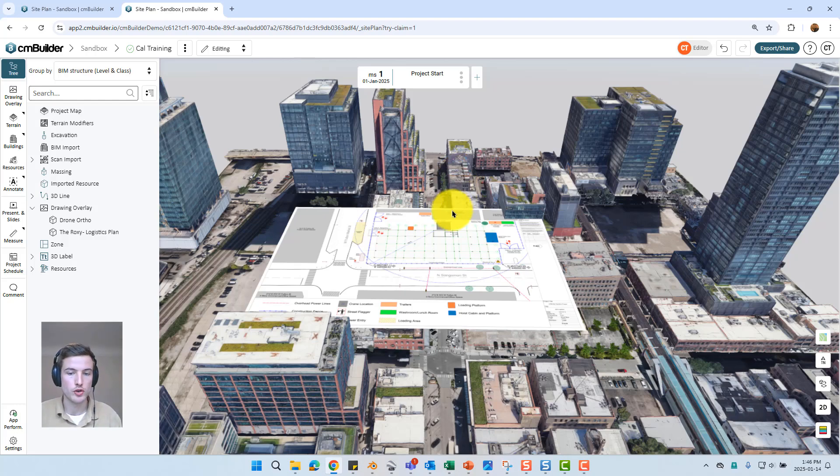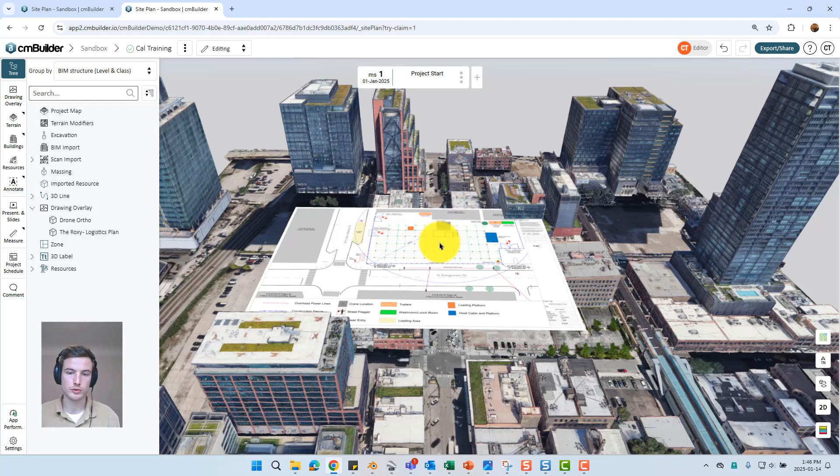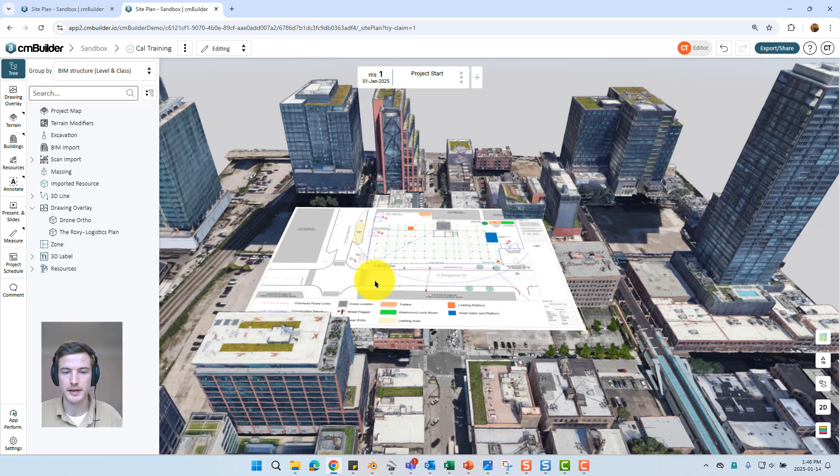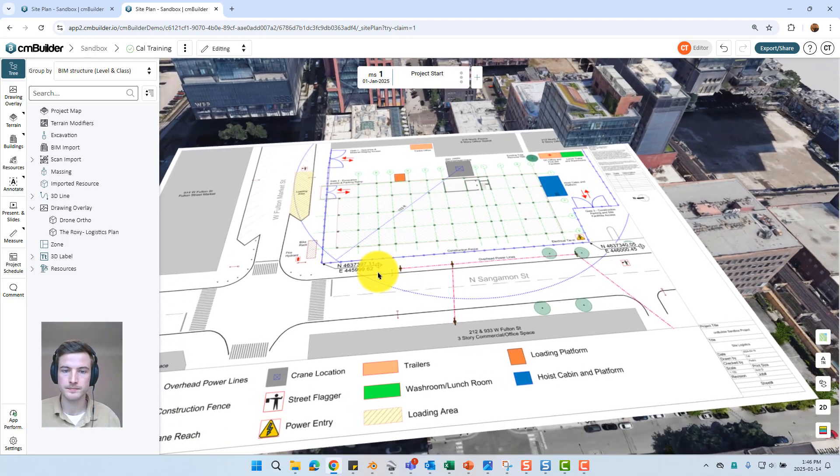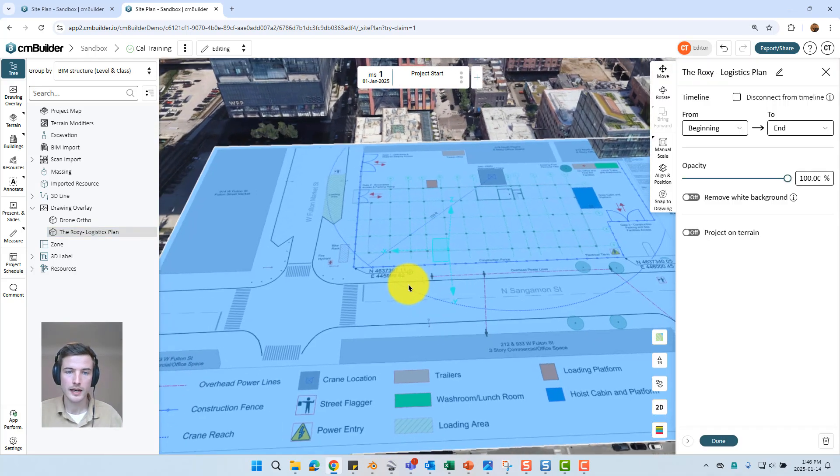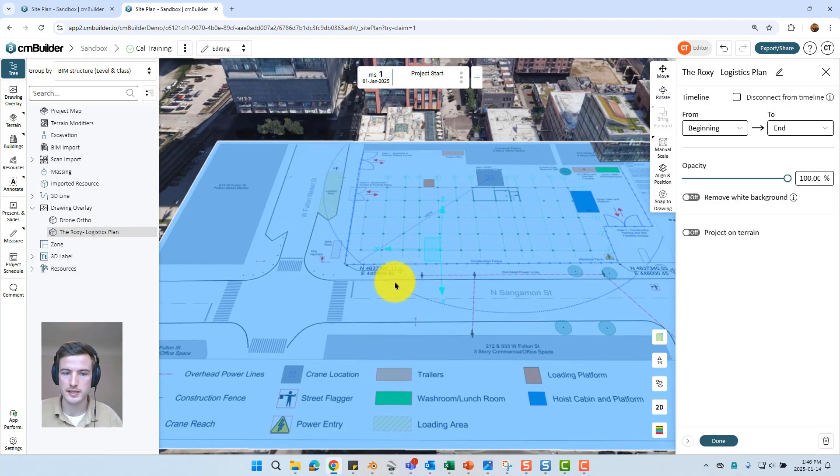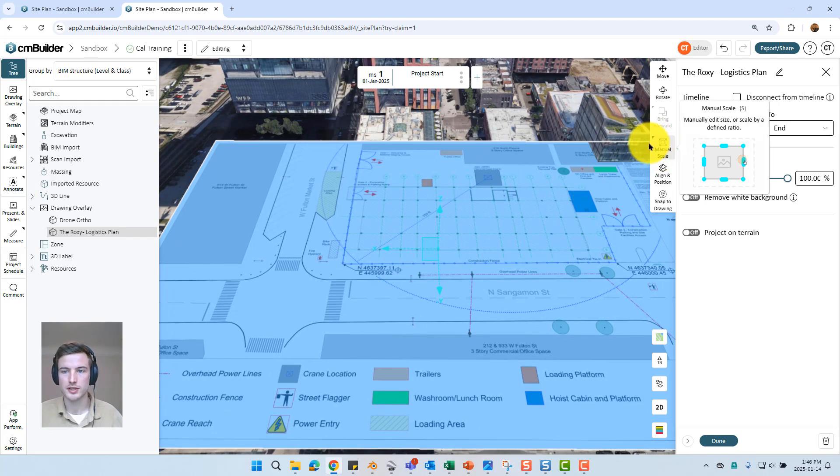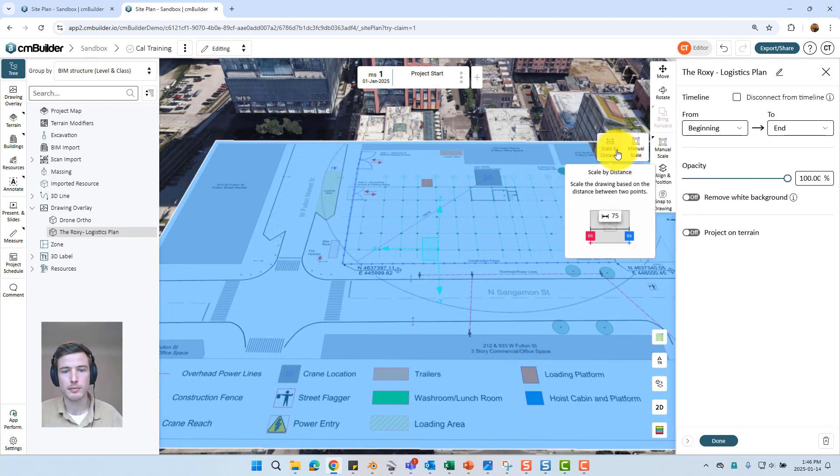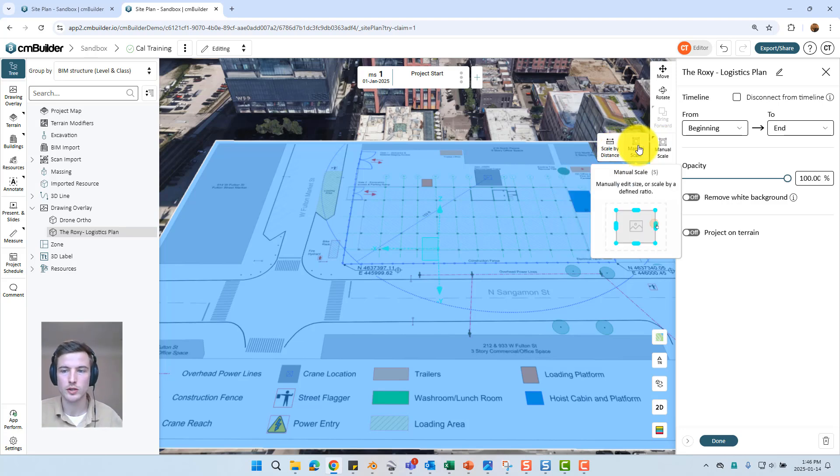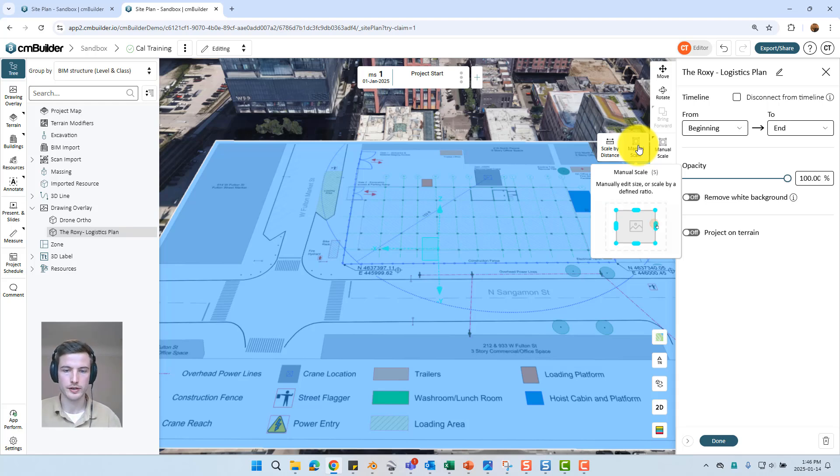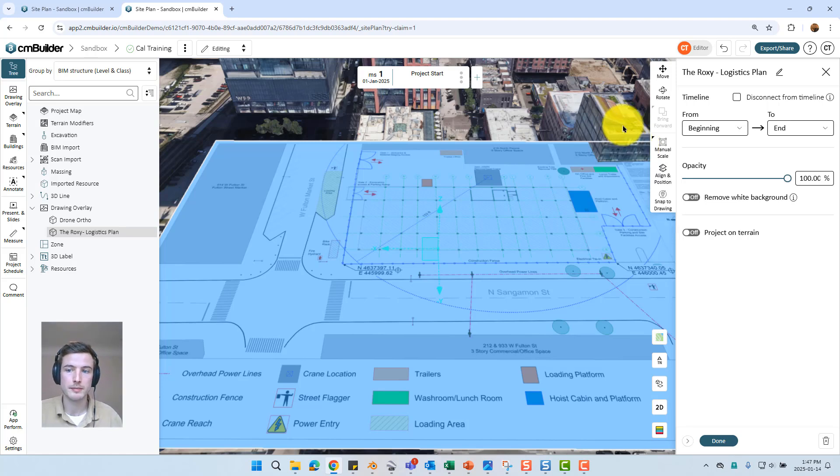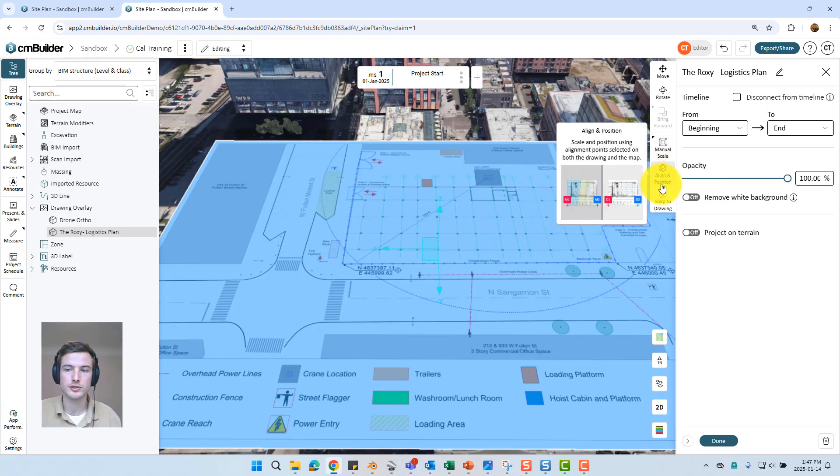Drawing overlays are the one thing you will have to scale inside CM Builder. Note that 3d models, resources, satellite data are all going to come in to scale automatically. Unfortunately that information isn't embedded in drawing overlays. A couple different ways we can scale it to the correct size. One of which is using the manual scale option where you can either scale by distance where you just select two points, type in the distance and it's going to scale it to the correct size. We also can use manual scale where you just type in that one quarter inch equals one foot ratio is typically in the bottom right hand corner of your architectural drawings. Or the method I typically prefer is using the align and position tool.